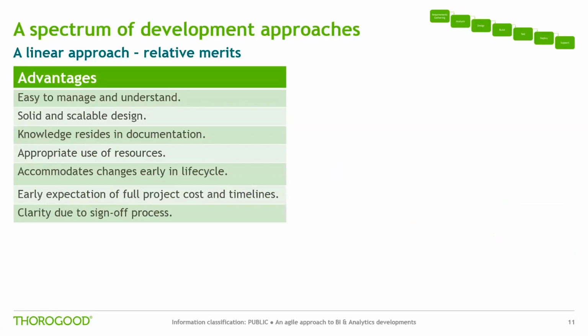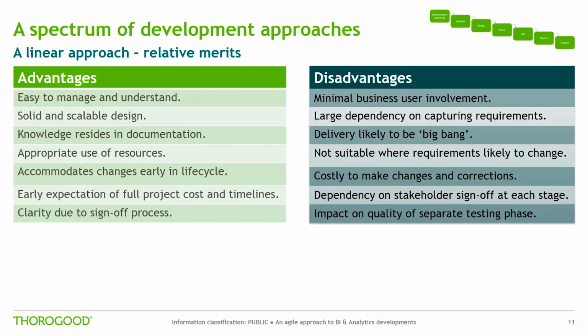It allows the customer to have early expectations of the overall cost and timelines for the full project, and therefore facilitates commitment to the whole project. And there's clarity from one stage to the next regarding what will be delivered based on documentation sign-off process.